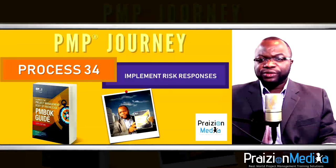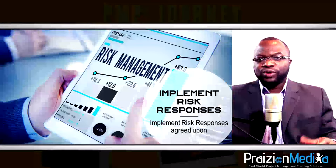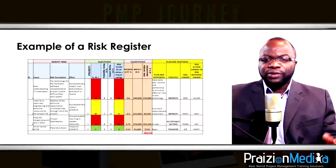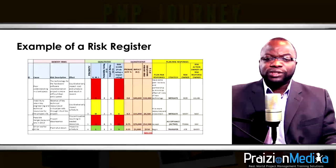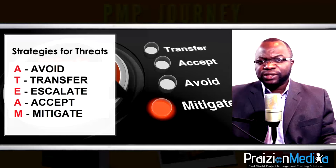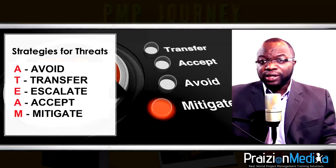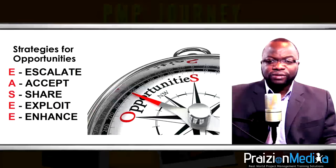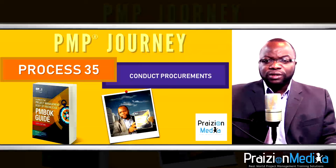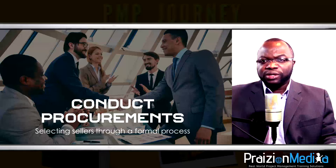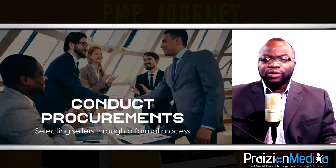Process 34: Implement risk responses. You've planned your responses — now this is where you carry them out. Risk owners and risk action owners take ownership for actions to curtail, contain, or avoid risks. This is a practical hands-on process to transfer, avoid, mitigate, accept, share, enhance, exploit, and escalate risks. Process 35: Conduct procurements. Your major goal is to carry out the bidding process — having bidder conferences, reviewing proposals, and ultimately selecting a seller and signing a contract.